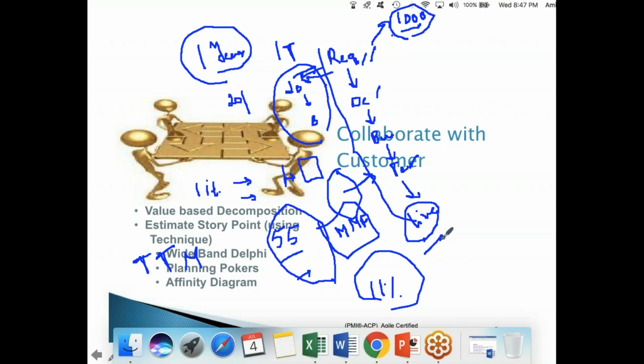If the same e-commerce site is built in the Agile way, you can start using it in 3 months, because we are giving the most frequently used, must-have or should-have features in an e-commerce site. As a customer, you can start the business in 3 months. And later, with each iteration, you'll start adding the features which are rarely used or less frequently used. You'll add those features later because they're less frequently used. Even without them, you can still survive. Right? So this is how projects in Agile are done.